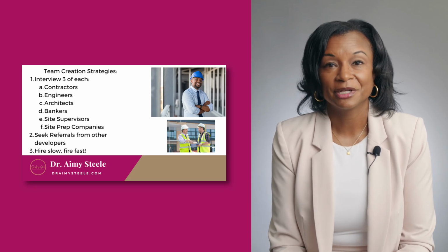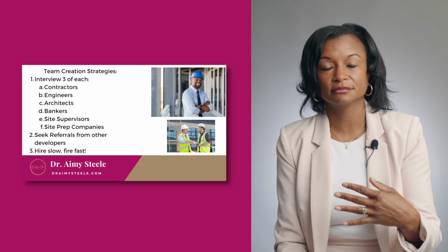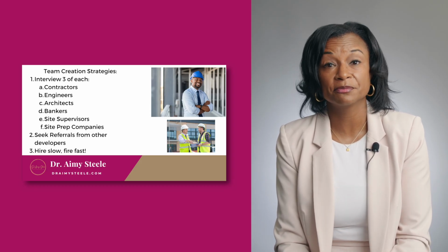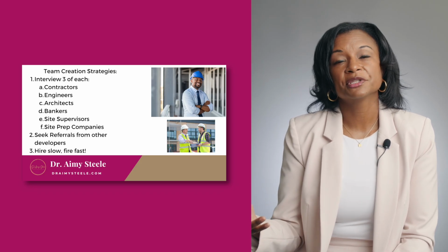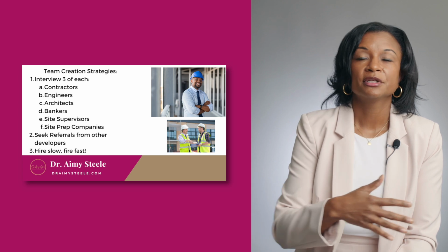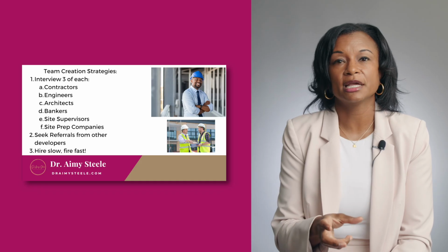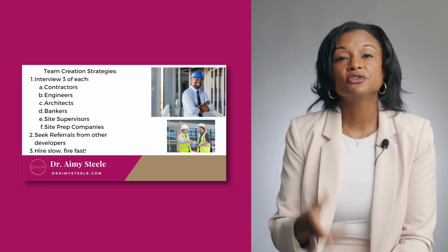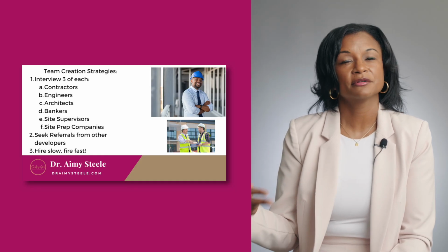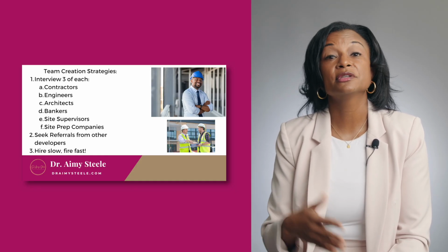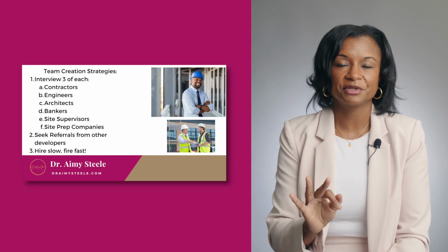I learned this the hard way: when the general contractor suggests a site person to come in and prepare the site for them to build, they are going to use the people that they've been using over the course of time, not necessarily factoring in all the things that may need to be done to this site and how they've priced in the past. So you've got to independently know what other site clearing people or site prep companies are available so you can make a good decision or help your clients make a good decision. So interview 3 site prep companies as well.